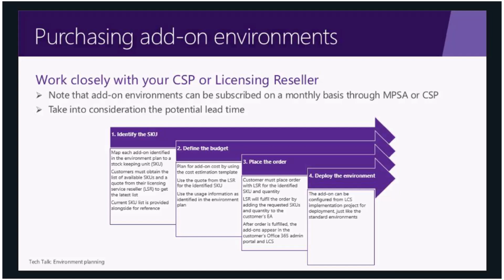We've seen different cases where, for example, they wanted to do performance testing after detecting performance issues, and they had to wait for a few weeks for the licensing reseller to place the order, to get a budget and so on. So the lead time forced them to wait to do their investigation on the performance issues. And this can be severe problems.